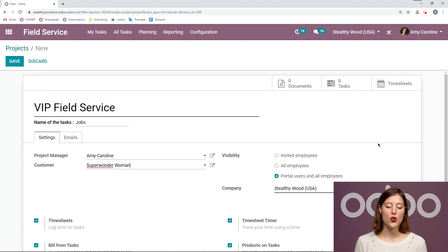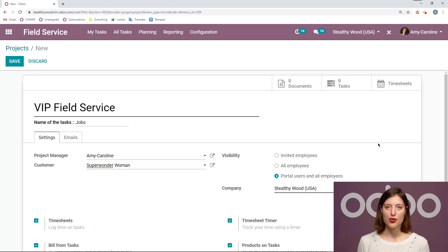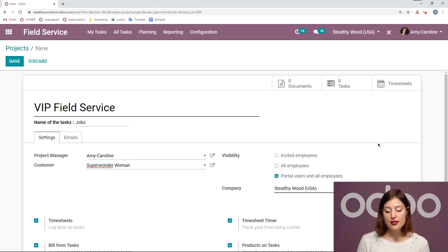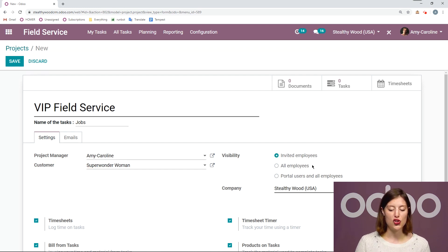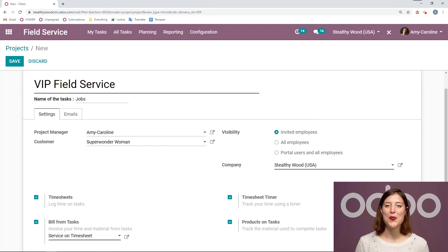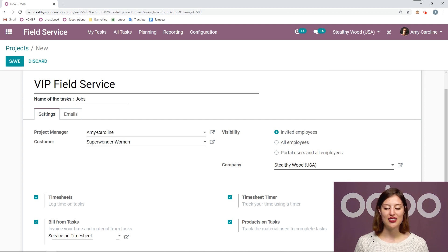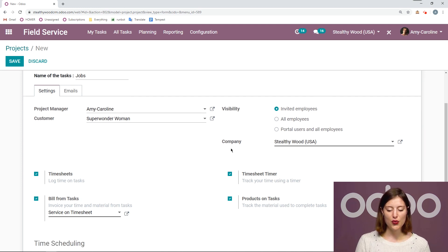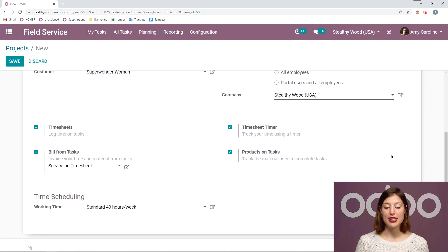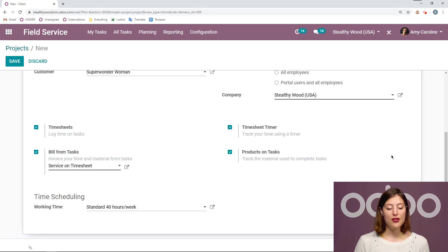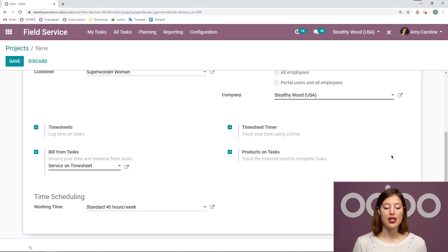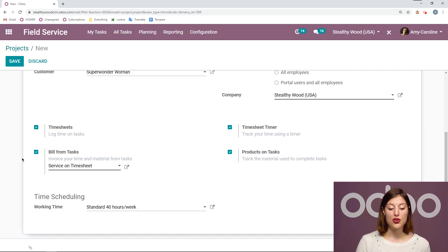On the right, we're going to have the choice for visibility. I can choose between all of my portal users and employees being able to see what's going on with these tasks. I can say only my employees or only invited employees, which might be a good choice if I'm working with some VIPs. Perhaps I only want my most experienced and most trusted employees working with them. Then of course, we can select our company. I'm going to be able to allow my workers to timesheet on tasks, which is very important. And then I can say that they can bill from tasks. And if I do choose that option, I need to add a product that will be used for the billing.